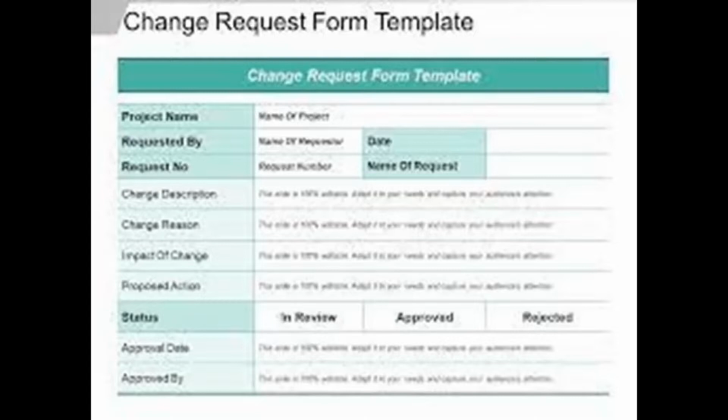Change requests may include corrective action, an intentional activity that realigns the performance of the project work with the project management plan. Preventive action, an intentional activity that ensures the future performance of the project work is aligned with the project management plan. Defect repair, an intentional activity to modify a non-conforming product or product component. Updates, changes to formally controlled project documents, plans, etc., to reflect modified or additional ideas or content.